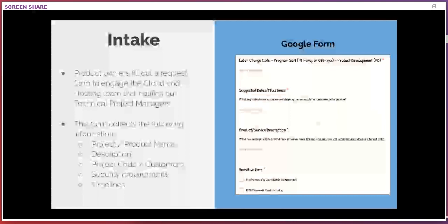After we have this meeting, we get back together and we all decide to commit to this thing. And then security also presents anything that they have risk or aversion to. If the product owner still decides to go forward with it, at least that's documented. FinOps presents the cost saving opportunities and labor, and usually we give them several options and they're able to choose the one they want to do. The goal of this meeting, or within a few days, is that we've committed to timelines, we've committed to resources.